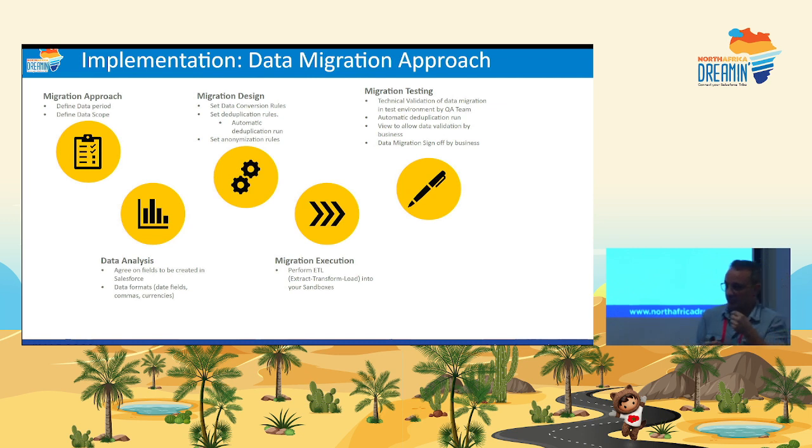So this is where your destination data is going to be the closest to your production environment. Here you're going to apply the things that you've learned through your testing, and you will also find unexpected things, but this is a safe environment to do it. You should have a good QA team or people from the business to validate that all of your data has moved across accordingly,